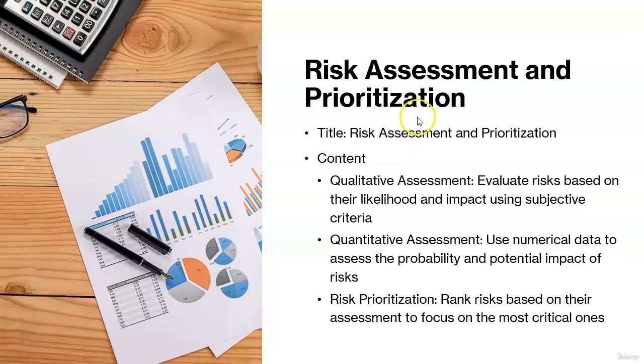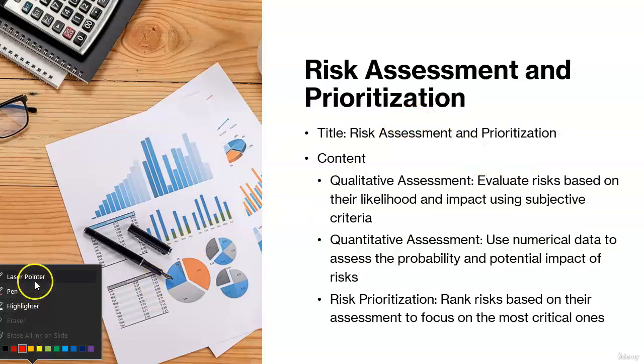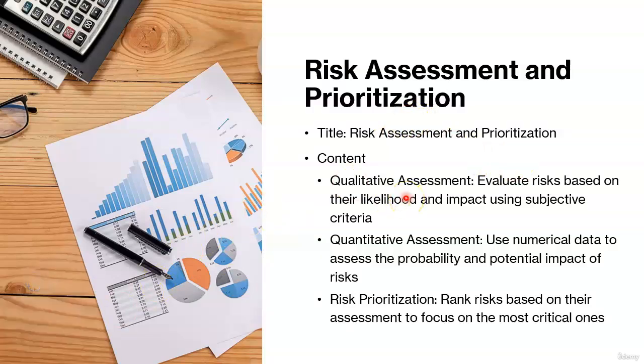Risk assessment and prioritization. Once you have identified potential risks, the next step is to assess and prioritize them. Like qualitative assessment, evaluate risks based on their likelihood and impact using subjective criteria such as high, medium, or low. Quantitative assessment, use numerical data to assess the probability and potential impact of risks, giving you a more precise understanding